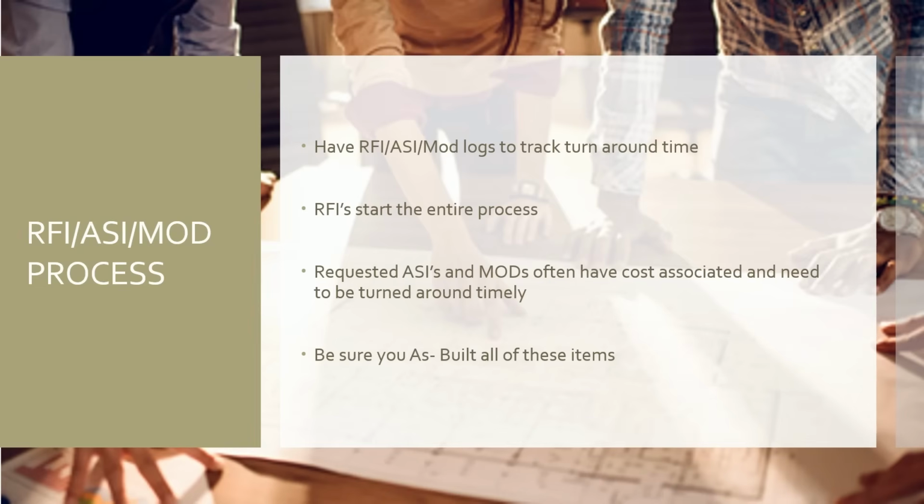But tracking the turnaround time, it's your design team that's going to start that clock. Some RFIs are only going to go between you and the designer, and you're just going to FYI them to your end user. Some of them, though, that actually affect the end product and the design may also need to go through your end user. So keep that in mind. It's just like a submittal, right? It could have multiple reviewers.